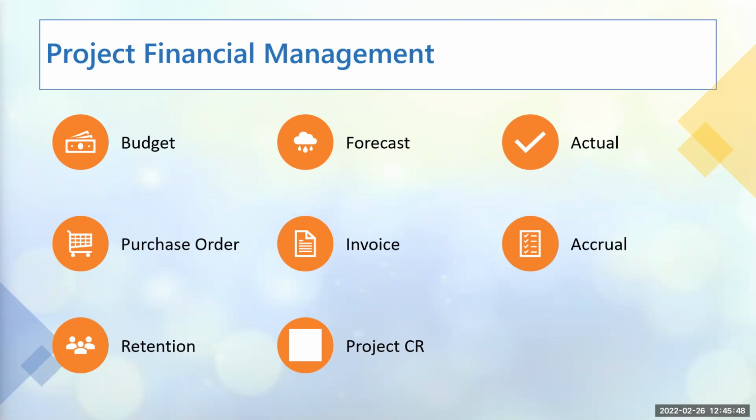Then the finance team will generate a 10% retention. So instead of you getting £1,000 based on the invoice that you've sent, you would get £900. They are taking 10%, which is £100, out.